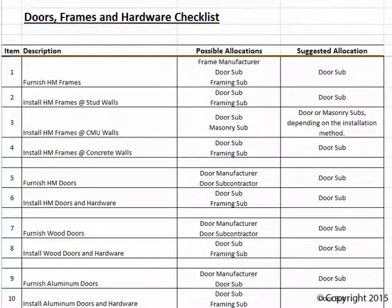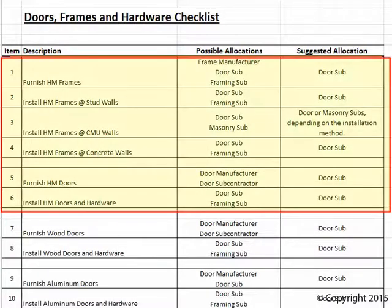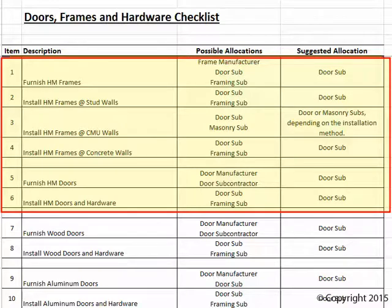Compiling bids for hollow metal doors and frames might involve bids from a framing manufacturer, the door subcontractor, a framing subcontractor, and/or a masonry subcontractor. Bids may be segregated not only by door type, but by where the frame is installed. You may have hollow metal frames in stud walls installed by a framing sub, while hollow metal frames at a CMU wall are installed by a masonry sub.